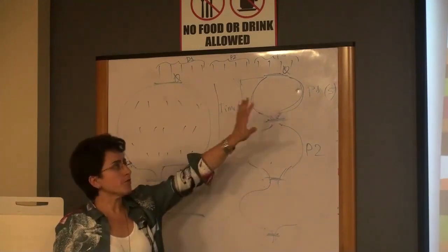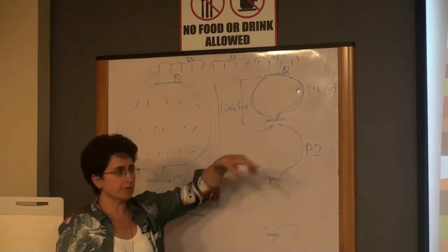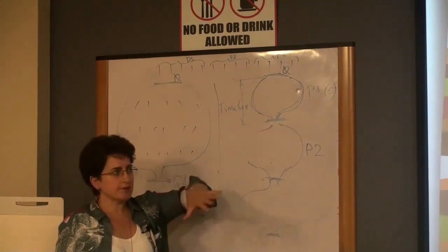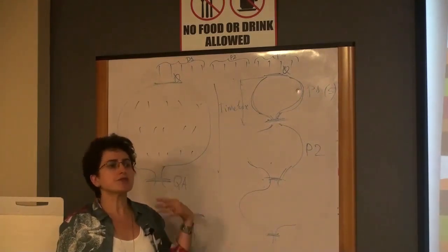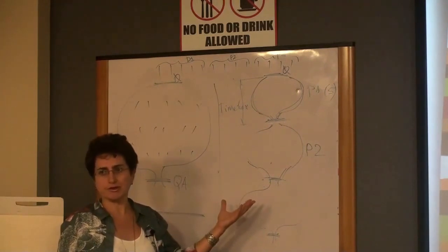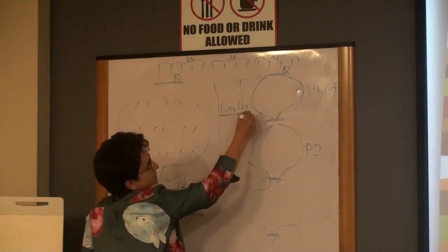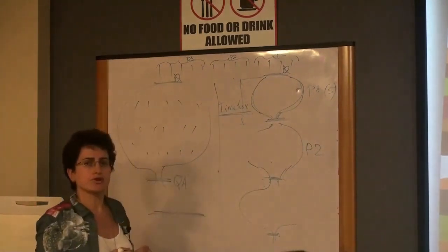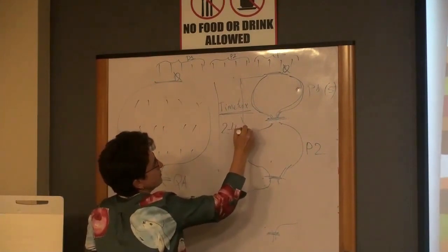Again, this approach is not applicable to each and every project, each and every software, because it depends on the complexity, and we'll talk about challenges in Agile and where it can or cannot be applied. But I'm just explaining to you the general principle of Agile. And so this time box varies again from company to company and project to project, but on average it takes from 2 to 4 weeks.